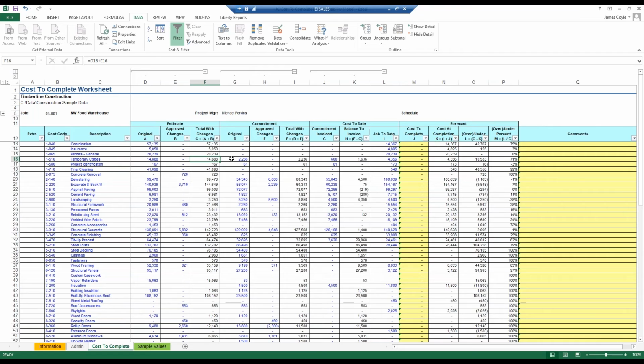I've got my approved estimate, my commitments and cost here, and I'm looking here and saying, am I on budget or not? And maybe it all depends on my cost to complete or my percent complete. So if the cost to complete is less than the remaining estimate to spend, then I'm good. But if the cost to complete I knew it was $40,000, then I've got cost overruns here. So now, who would know that information? The stakeholder is probably an operational person who should be aware of these things. Finance should be aware.